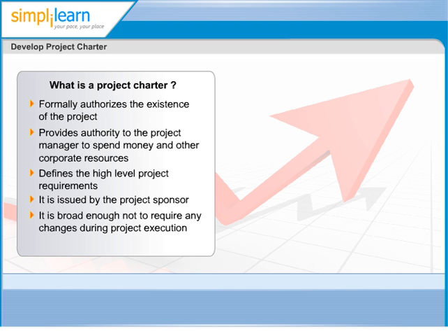In many organizations, the Project Charter tries to cover detailed risks, schedule, cost, etc. of the project. But let me remind you that a Project Charter is not a project management plan. The detailed risk, schedule, cost analysis, etc. is part of the project management plan, and it should be done during the project planning phase, when there is more details about the project available to do so.